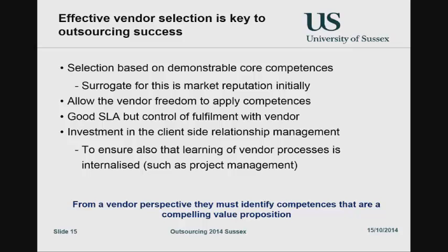If you hire a vendor to carry out your service desk operation, do not impose on that vendor your own software solution to manage the service desk. That is absolutely crazy. Good service level agreement, but control of fulfillment with the vendor. That means let the vendor do the job. You manage the service by service level agreements. The vendor does the job based on their world-class processes and techniques. Don't impose your own.